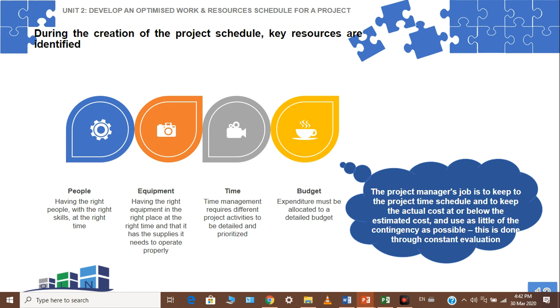On the reverse of all of that, we might find that we have four people that can only provide a quarter of their time to a specific process. The process will remain at a specific time. So let's say we had 10 days, and in the earlier example I put four people on, it comes down to 2.5 days if it's effort driven at 100%.